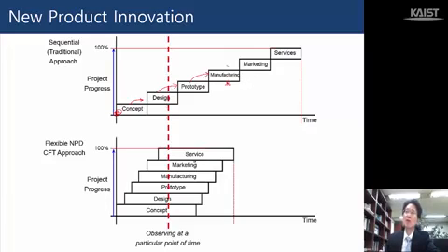But suddenly, when manufacturing people look at this prototype, they realize that with the current manufacturing system, they cannot make that. In other words, they cannot realize the concept 100% as expected by concept developers. In other words, there is a huge discrepancy between concept and manufacturing. So we cannot actually make that product using the current manufacturing system. That's a really serious problem.